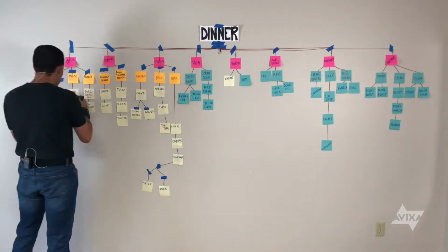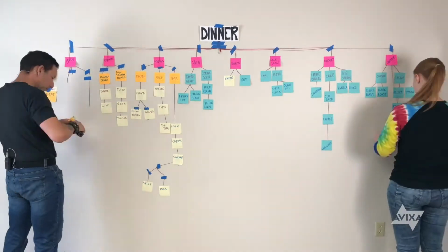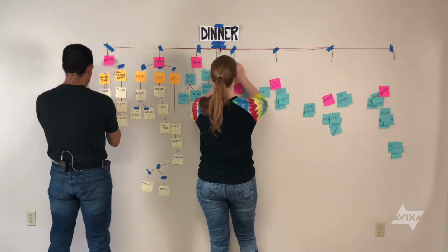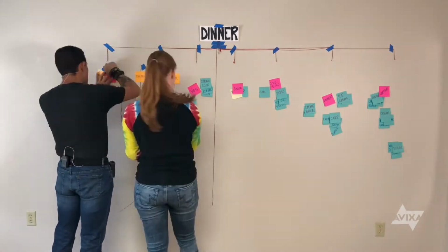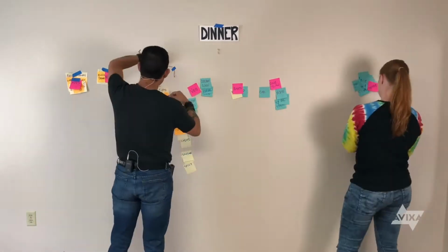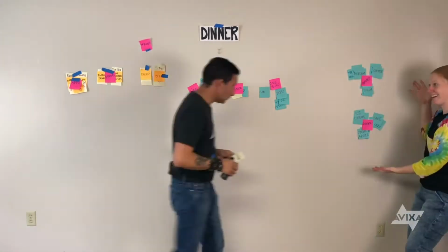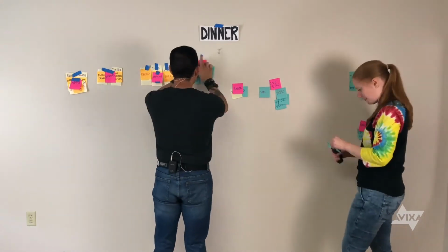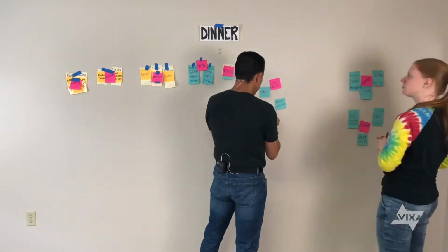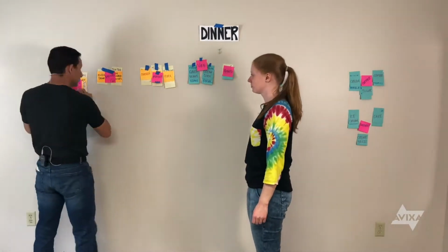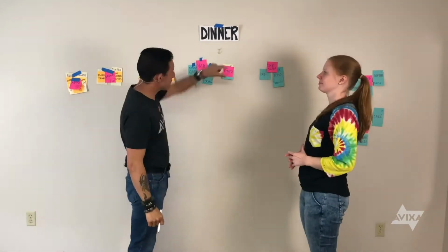Okay, so let's create a logic network diagram for my task. I need to figure out at what level I'm going to start and in what sequence the tasks need to be organized. Then, I need to lay out those tasks and figure out task dependencies. What tasks need to happen before other tasks can start? Once I have a sequence, I can estimate how long it's going to take each individual task.